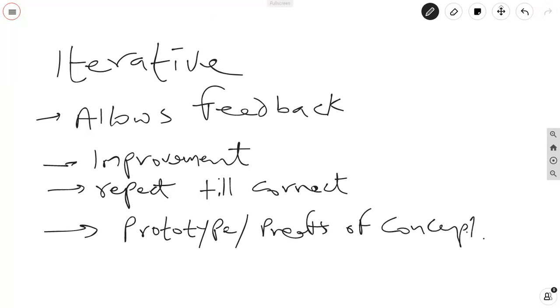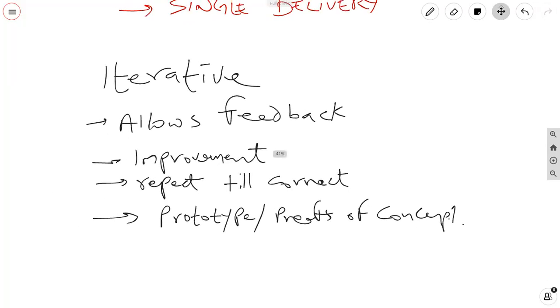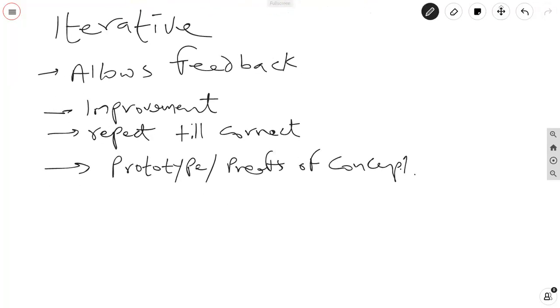It says each new prototype yields new stakeholder feedback and team insights. Then the team incorporates the new information by repeating one or more of the project activities in the next cycle. Teams may use time boxing on a given iteration. So for iterations, it is possible to use the concept of the time box.